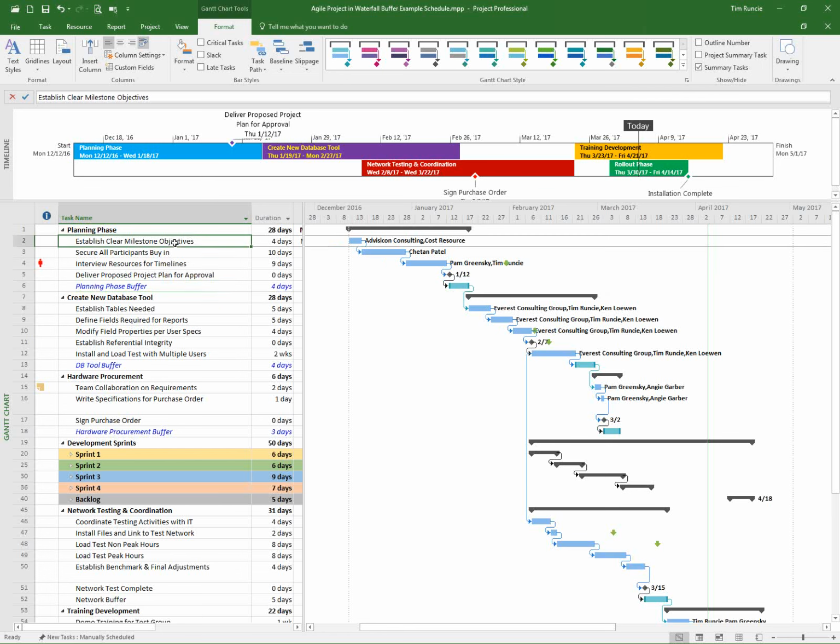So overall, if every task was estimated to have a low or a high, what we're going to find is that if we take our low estimates and look at our high estimates, we certainly can create a buffer task. But what we want to do is make that buffer, or that float or slack or that kind of padding that people put there, visible.